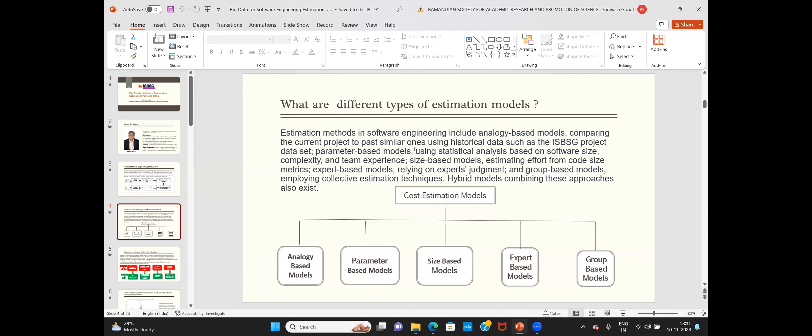You can develop a regression model with inputs like software size, complexity, and team experience, and it can provide outputs like effort and manpower. Size-based models estimate the size of the software to be developed and divide by the productivity ratio. In my opinion, this can provide a lot of variance in estimates because the productivity ratio varies between different technical staff and even at different times of the day. A simulation model may be more accurate to depict the variance of the productivity ratio.